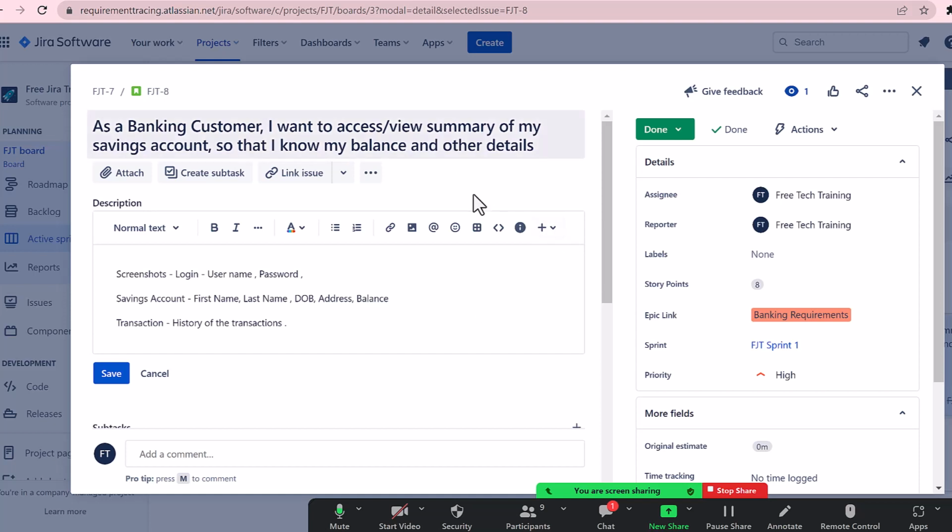Maybe to develop this it will take maybe like 2 sprints or something. Don't put such large requirements. You always need to break down the requirements. I've already told you the maximum points is 13. But we have to make sure within 8 pointers, because the sprint time could be very limited.